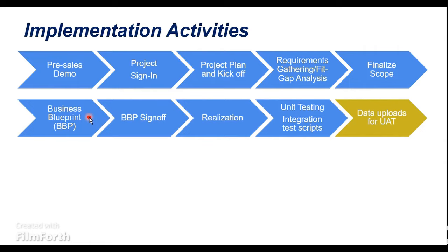So once the BBP has been submitted to the customer, they are going to review internally, and then they have to sign off that particular BBP, saying that yes, this document holds all the information that we discussed and is in line based on our discussions. So once the BBP has been signed off, only then the realization starts.